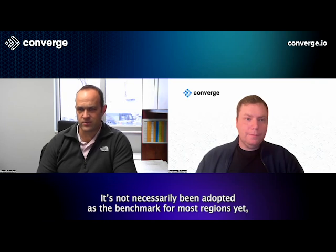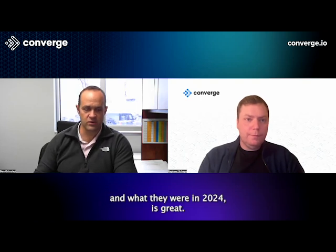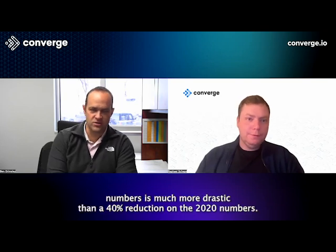I think the 2024 NRMCA report is out. It's not necessarily been adopted as the benchmark for most regions yet. However, it is out there for people to look at. And the numbers that we've been able to reduce over the past 4 years between what the benchmarks were in 2020 and what they were in 2024 is great. But a 40% reduction off the 2024 numbers is much more drastic than a 40% reduction off the 2020 numbers. However, that's the direction we're going.